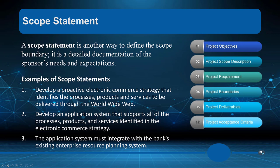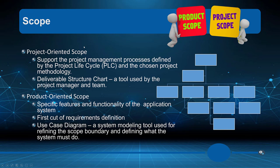The scope statement is another way to define the scope, done at the package level as well. It includes project objectives, scope description, project requirements, project boundaries, who will work on the project, project deliverables, and project acceptance criteria. Just because we create the product and it seems to work doesn't mean it's accepted — the customer must accept it. We tie that acceptance to the milestone: the milestone is when the prototype or project package is formally accepted.